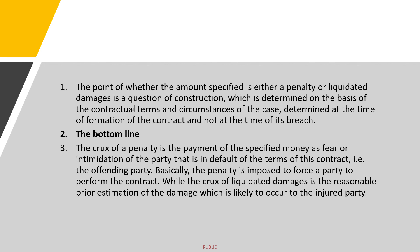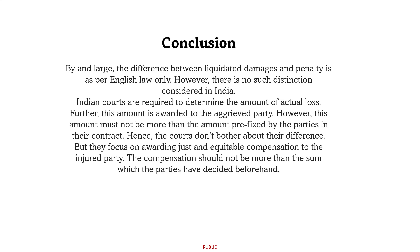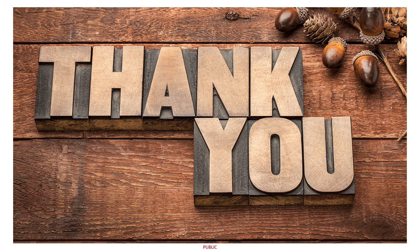The crux of liquidated damages is the reasonable pre-estimation of damage likely to occur to the injured party. In conclusion, the difference between both largely exists under English law only — there is no such distinction in India. Indian courts are required to determine the amount of actual loss and award it to the aggrieved party, provided it does not exceed the amount prefixed by the parties in their contract. Courts focus on awarding just and equitable compensation to the injured party, not exceeding the sum the parties agreed upon.